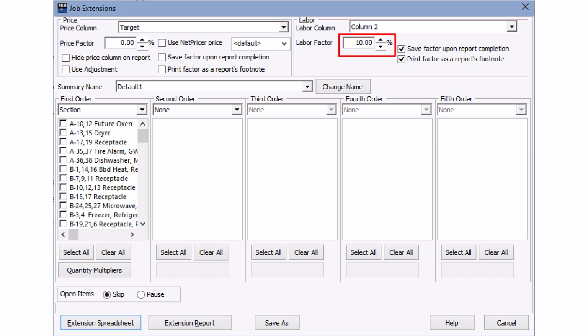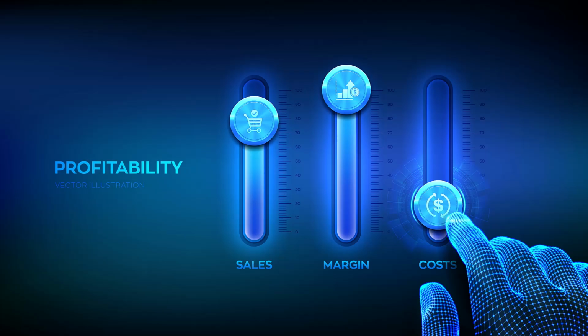Difficult plus 10%, for example. This helps to fine-tune the labor unit to match your own company's rate of installation or to be more competitive. It should make sense that the more difficult the installation, the more time it would require for the installation.